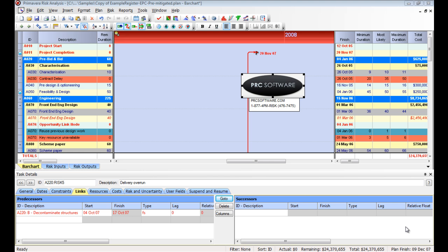So there's two bits to this. The first is the process and how you're going to run the what-ifs. What makes sense? How are you going to work backwards? Because if you do too many mitigation steps at once, you can't really see what part of the mitigation helped you and what part didn't. So we'll go through the mitigation steps, how we're going to do it.